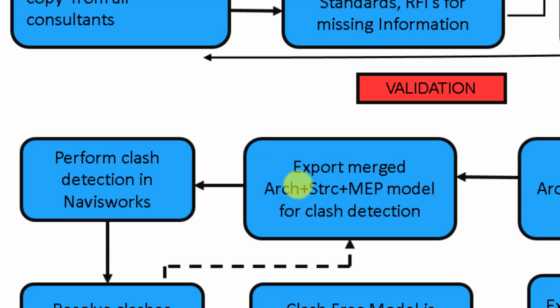where we have received the drawings. That may be identified during the modeling stage itself, but even there are clashes which have been missed out in the modeling stage. Those clashes can be identified through a software called Navisworks. So we perform this clash detection inside Navisworks.